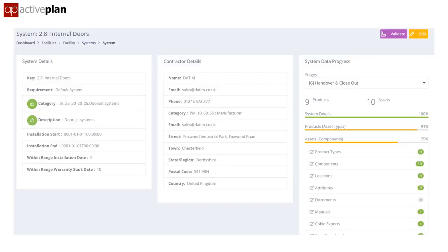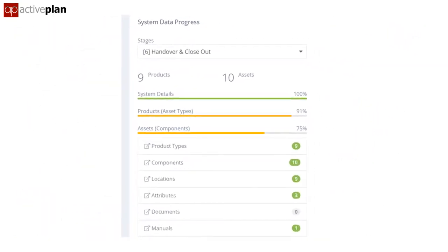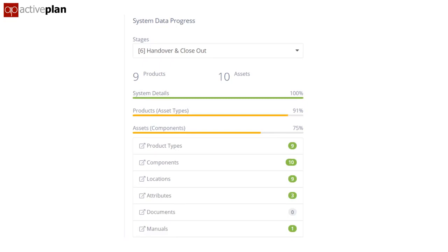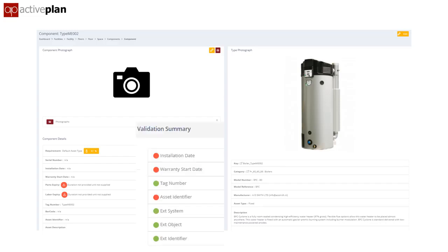This dashboard tells you which contractor is responsible for each system — in this case internal doors — and how much they still need to provide for this work stage. The contractor can drill down and see the individual installed component, add a photo, and get a dashboard of the information that still needs capturing.